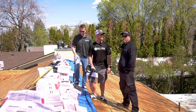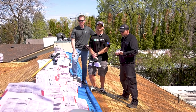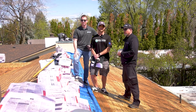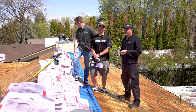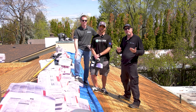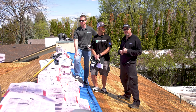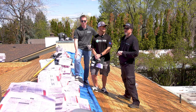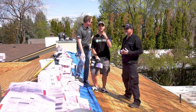So from a production manager standpoint, you wanna make sure that the color's correct. You wanna make sure that the count is correct. You know how many squares the roof is and you have access to the material order. Count it, make sure it's correct. Are the right accessories up here? And then if you're here and the crew's here, you might wanna ask the crew, very simple, hey, is there anything you need? Is there anything that didn't get delivered? They'll know. And if there is something that needs delivered, well, then you can send a message to your QC people. Discovering this stuff on your first stop, first time on the roof, is gonna be a Bartlett pro tip for you.